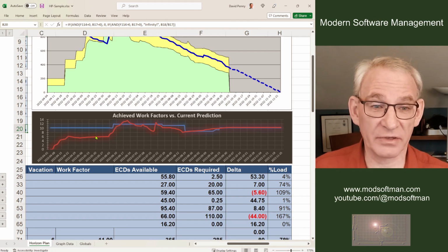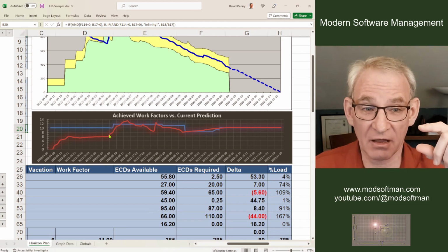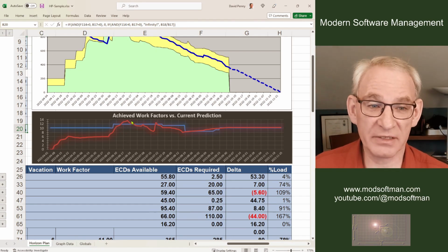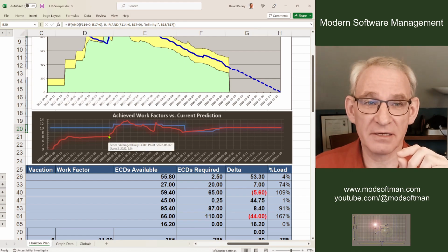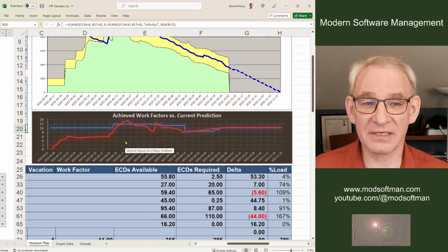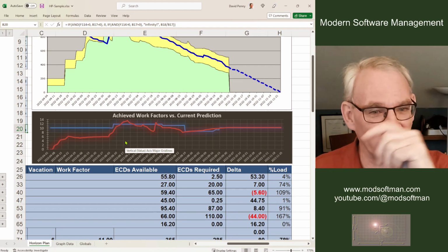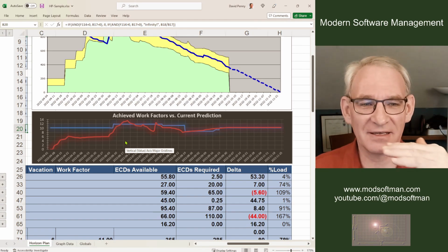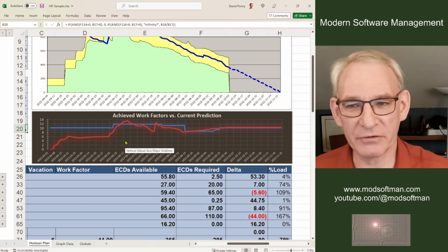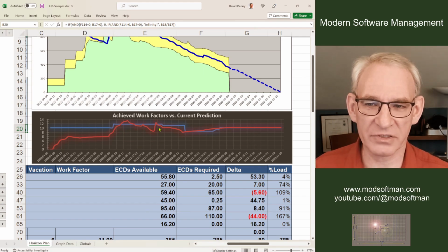Red is the actual that's logged. So what you do is basically every day time is logged, and we average that out with an exponentially decaying average. And so that smooths it out a bit, because what happens is a manager will notice, for instance, that time hasn't been logged recently. They'll go back to a team member and say, hey, you haven't logged your time. And the team member says, oh, sorry. They go back in, and for the past week, they fill in all the time they actually did into Jira. And suddenly, on a single day, it kicks way up. But that really should be smushed over a week. But our tools don't have the ability to capture that correctly. So smoothing out works as well.